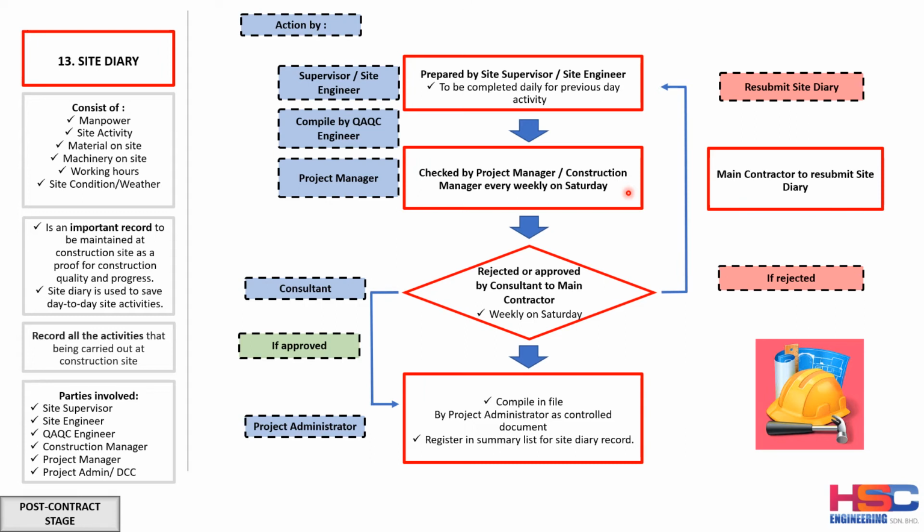Don't wait too long. Don't wait until one month to pass the site diary to the project manager. The best practice is the QAQC engineer or the planning engineer on site collects the site diary every day and passes it to the project manager once a week.